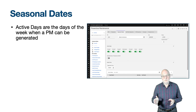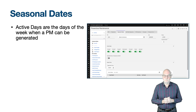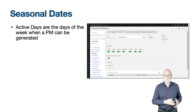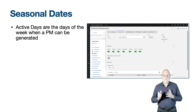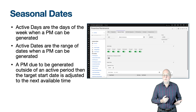The PM also allows you to set an active time, which would normally be the start time of the shift. The active dates table window allows you to build multiple periods using start day, start month, end day, and end month fields. An active period defines when you accept a work order to be generated. If it falls outside the period, Maximo will generate the work order to start on the first day of the next active period. For example, some PM work cannot be performed in winter, so you may set the active period from 1st March to 30th November.